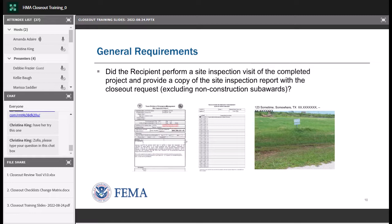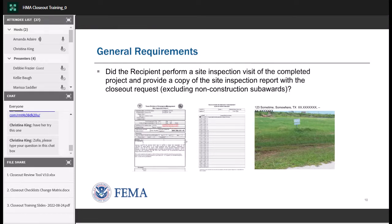For construction and non-planning projects, we're looking for a final site inspection — confirmation that a visit was completed to verify the scope of work was complete. For acquisition and demolition projects, we're verifying the latitude and longitude coordinates for each structure. For other construction projects, we need to make sure the location approved in the application or any scope-of-work modifications matches what actually happened. We want to confirm we didn't construct and pay for a project in an area not cleared by environmental and historic preservation laws and regulations.